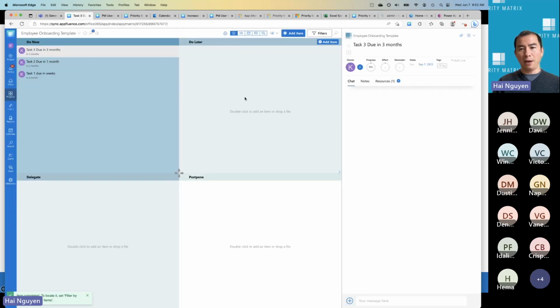You see how it makes it very easy for me to navigate, especially if you have these linked tasks that are actually in other projects. So the ability to link tasks actually works across projects as well. So it's not just within one project. You can say these tasks are related. And so if somebody else has permission to access the other project, they can link those tasks together, and then you can jump back and forth between them. Very, very useful when you're working with a complex task with a lot of different dependencies.